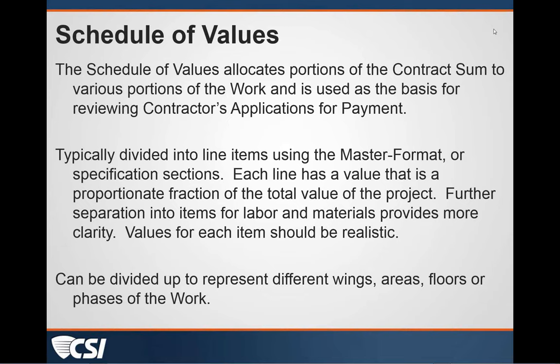I often think the construction community wants to be sure they're able to, I won't say hide, but camouflage their overhead and profit. And as Doug described, it's easy to get overhead and profit on big numbers, like a steel package. So they typically get their money out of the job early so that they've got funds to operate with.